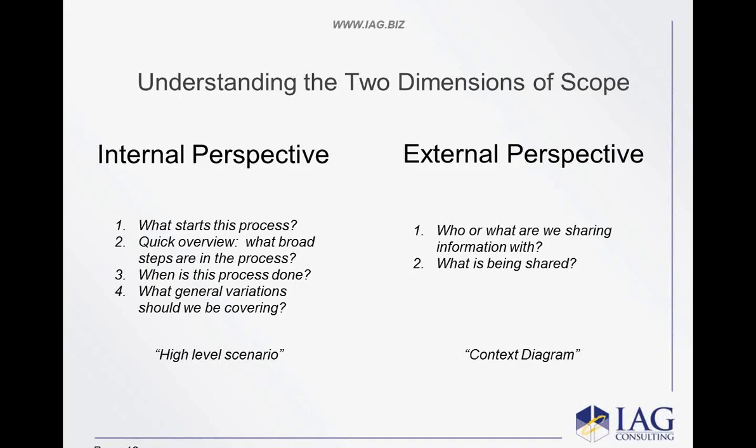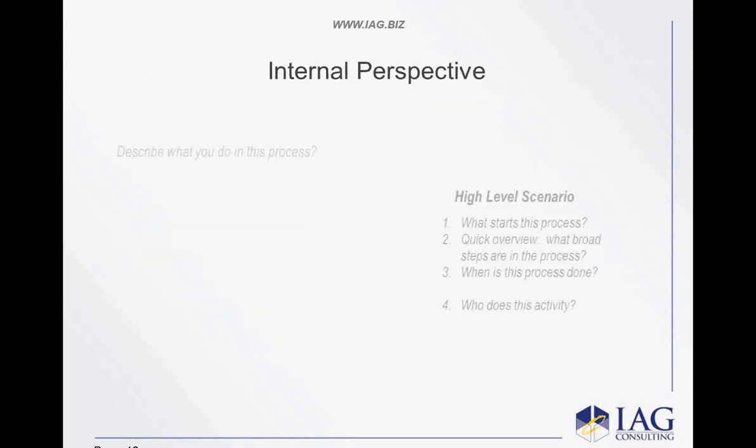If there are issues with respect to the prioritization of the goals themselves, then first and foremost what you need to do is start separating out the way the goals are structured so that you've got a clear understanding of vision, goal, and objective, and then, if there's a lot of conflict there, have people prioritize and let them decide what is the priority. And that will help you uncover it, Brandon. But it depends on if it's structural, if it's truly vision-oriented in your goaling.